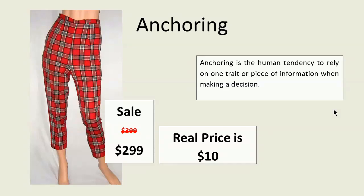This is called the anchoring heuristic, and describes how we always use a reference point when we try to quantify something. In project management, anchoring becomes a factor when we try to estimate things such as cost or duration of the project.